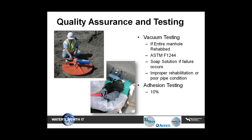If the entire manhole, including invert and pipe penetrations, is rehabilitated to as-new condition, then a vacuum test may be performed according to ASTM F1244. If the vacuum test fails, the contractor shall spray the entire manhole with a soap solution and retest. The inspector shall determine if failure was due to improper rehabilitation, poor pipe condition, or improperly seated plugs. If the inspector determines that the failure is due to improper rehabilitation, the contractor shall repair according to manufacturer recommendations and retest until a successful vacuum test is achieved.